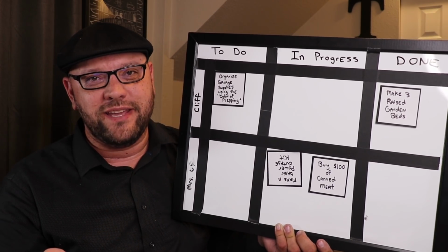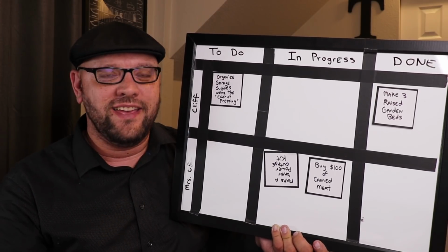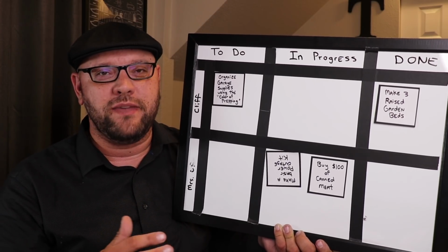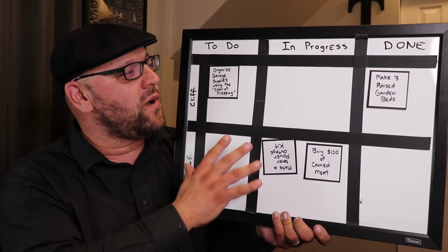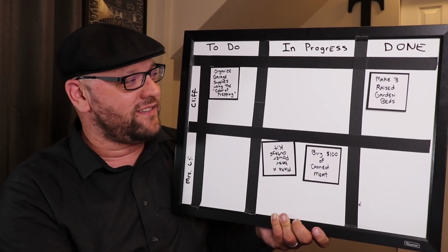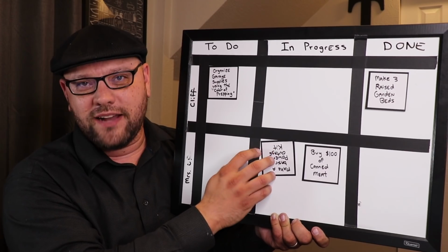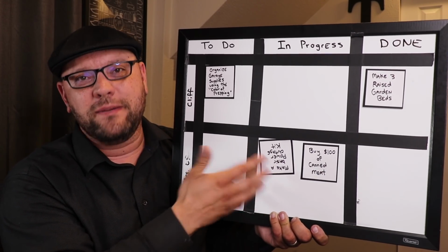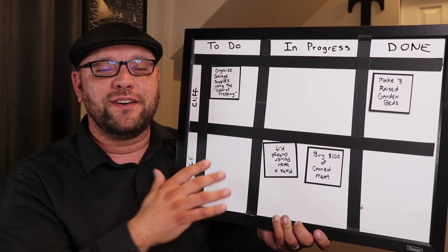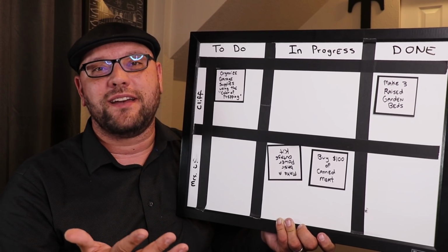They call it a stand-up meeting because it shouldn't be a long meeting that you'll want to sit down on. It should be a really quick meeting where you're able to stand up, look at the wall, and talk about all the tasks that you're working on. You can say, yeah, today I'm working on this, I'm blocked on this. And then if you're blocked, maybe someone's going to help you get unblocked. So if you're doing this for your prepping stuff, you could actually sync together.